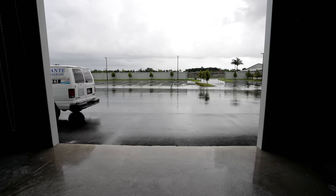Molds here. We pull molds because of our space constraints, and because these boats have gotten so big, we are pulling molds in and out of that space that we just walked through, which again delays production, right? So if I need to put a cap mold in and take out another cap mold, I'm building a cap for a 39 and I pulled out the 35, and so on and so forth, that takes time, right? Everything is time consuming with our original setup. So all these molds will now be indoors and ready to go when I need them.